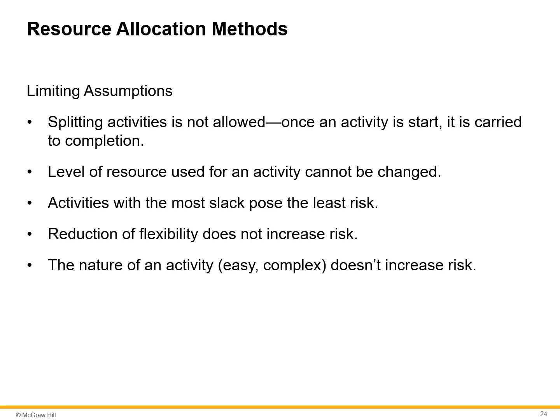Assumptions: ease of demonstrating the allocation methods available requires some limiting assumptions to keep attention on the heart of the problem. The rest of the lesson depends on this assumption. First, splitting activities will not be allowed. This means once an activity is placed in the schedule, assume it will be worked on continuously until it is finished. Hence, an activity cannot be started, stopped for a period of time, and then finished.